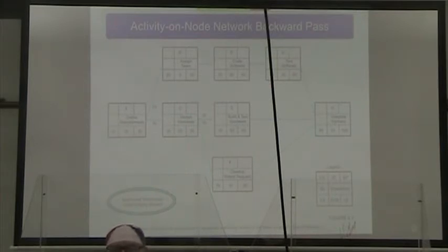here E and F both go back to the split activity of C. So it is a choice of what goes for late finish, and the smallest time, in this case, is the late finish time.